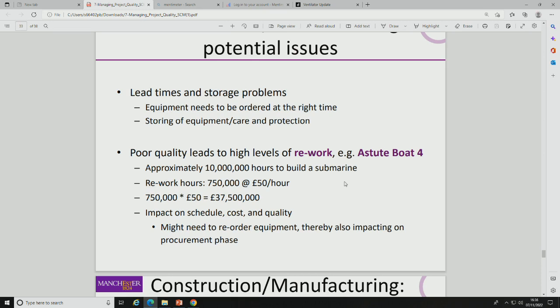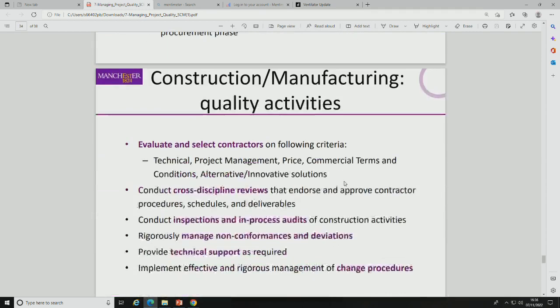So the accumulation of errors could promote poor lead time, even though you've made trade-offs in the Iron Triangle. Back to our example of BA Systems and their stable floor. They're assembling aircraft canopies with lots of electrical connections, thousands of them. If you just get a small percentage wrong, it's still a lot of connections you have to rework. So if you're dealing with large complexity, some of the percentage errors can be quite significant. By the time you get to the end of your quality gaps, your rework could still be a significant cost.